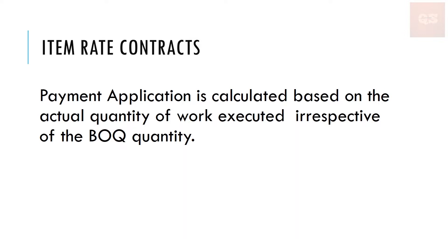An item rate contract is when the payment application is calculated based on the actual quantity of work executed, irrespective of the BOQ quantity. For example, if your BOQ quantity is 50 for an item but the actual work executed becomes 60, you can claim this in your payment applications without any variations. In a lump sum contract this additional quantity would be a variation, but in an item rate contract it becomes part of your payment application, and depending on the percentage of increase, the contract may allow rate modifications.